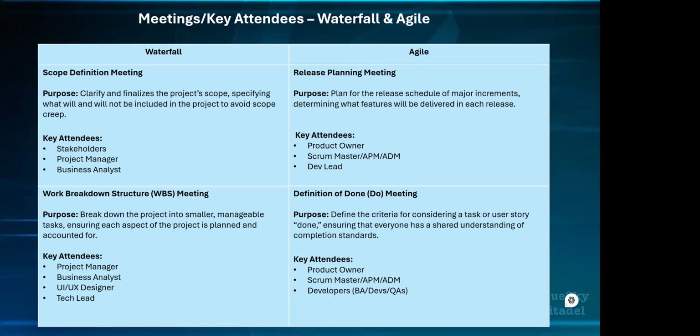The key activities are to identify the tasks, organize the task hierarchy the way it should be, what comes first before the other one, and assign preliminary resources and timelines to things. And then the outcome is to have a detailed work breakdown structure and an initial task assignment. That's what it is.